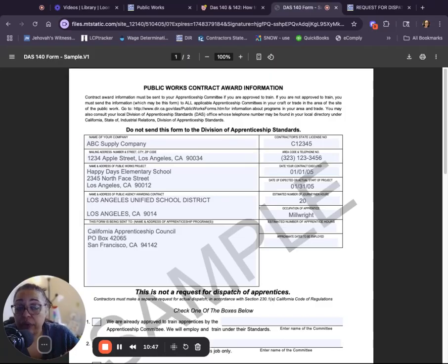If you're a contractor or subcontractor performing work on the job site of a public works project, you need 20% of those total hours to be apprentice hours, where your apprentice is working at an apprenticeship program, not just someone who doesn't know what they're doing. They need to be enrolled in a school to learn this skill.